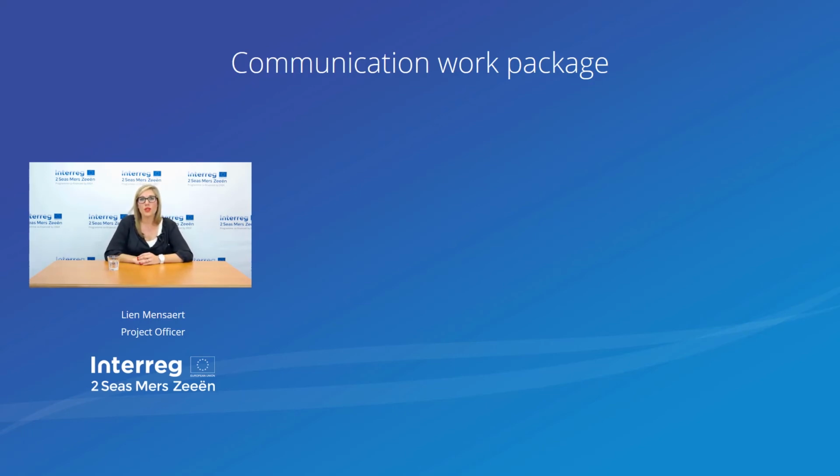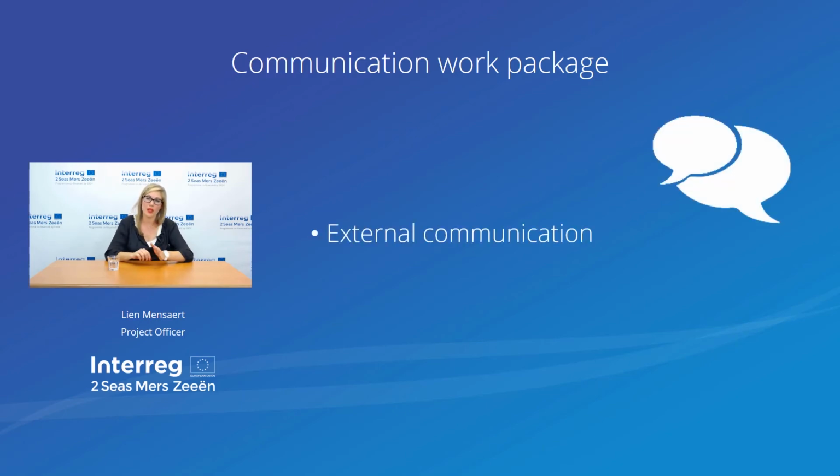So first of all, the communication work package. In the communication work package, we have to make a clear distinction between external and internal communication. External communication will be dealt with directly in the communication work package, while internal communication we will have to detail in the management work package.